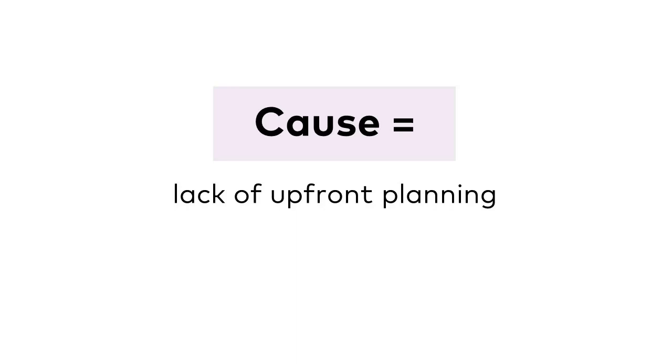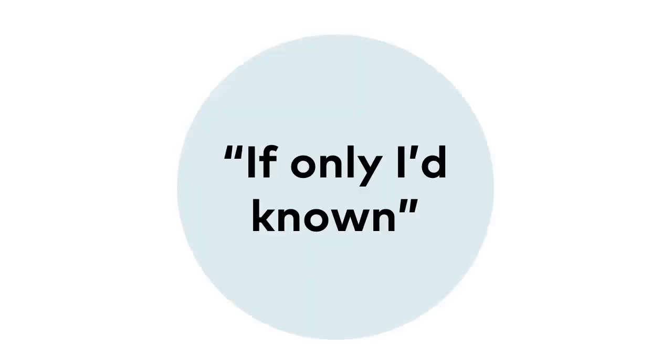And when shortcuts are taken early on and people rush into the design phase, then people do not discover all the options they had or what they really wanted until the concrete has already been poured. Without getting a full needs and options review conducted before the builder gets on site, you will change your design. Late discovery of your real needs or options leaves you crying, "If only I had known." That is why we created the needs and options review.